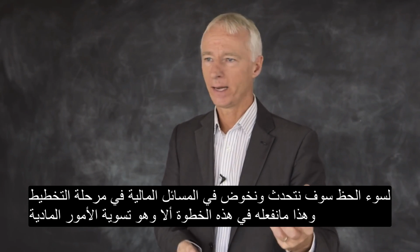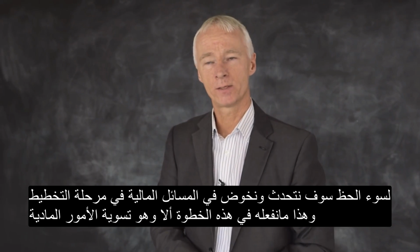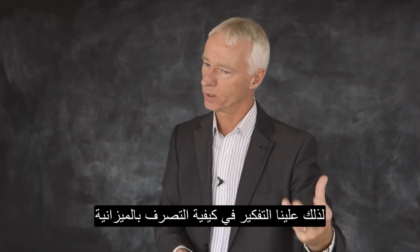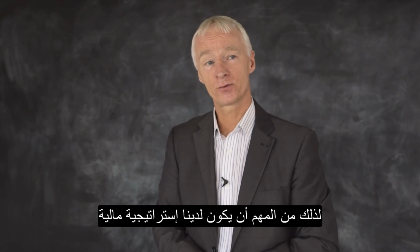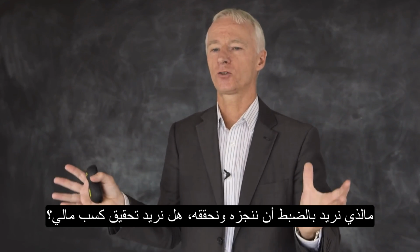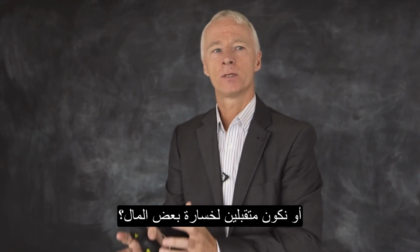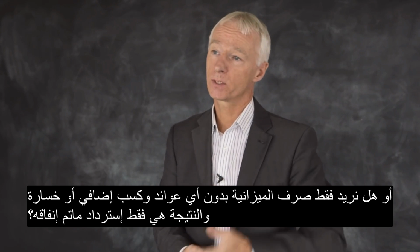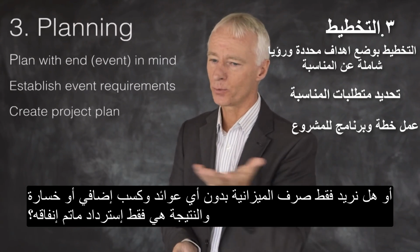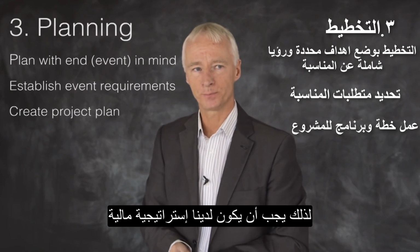Unfortunately, we're going to have to talk money, and at the planning stage, that is exactly what we do. We talk money. So we need to think about the budget, how it's going to work, what we're going to do with it. And importantly, we need to have some sort of financial strategy. So what is it we actually want to achieve? Do we want to make a bit of money? Are we happy to lose a little bit of money and accept that that's okay? Or do we just want to spend the budget? So it's just a break-even budget. So there is some need for financial strategy as well.